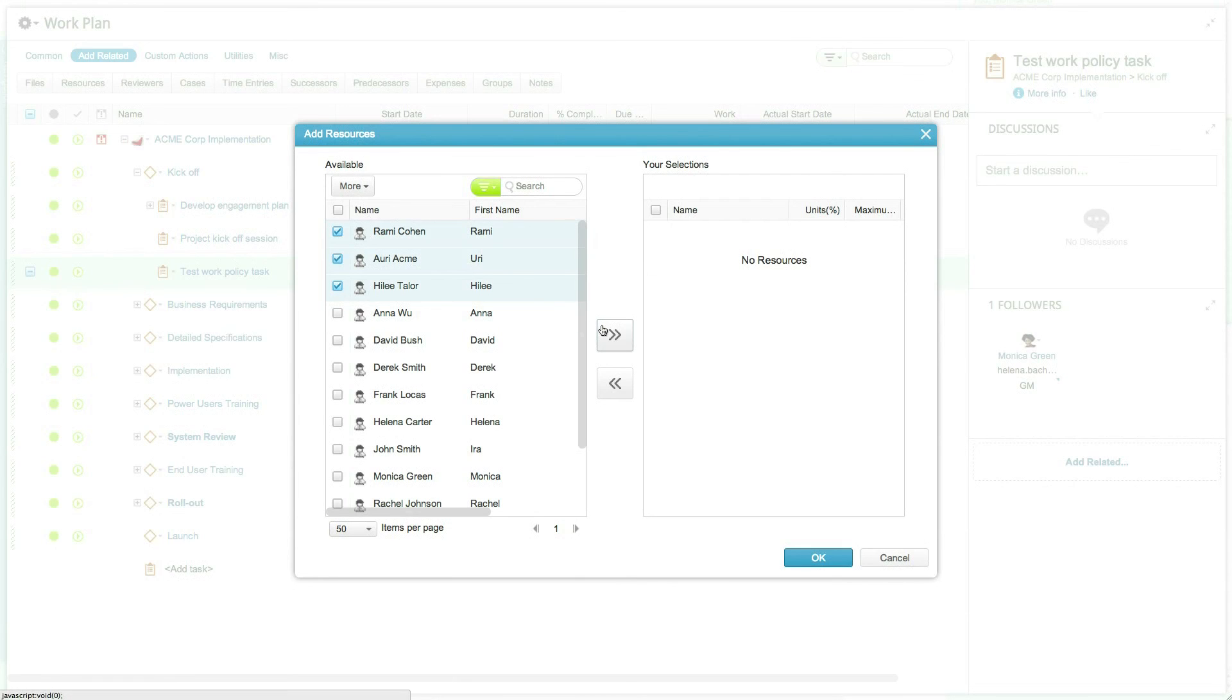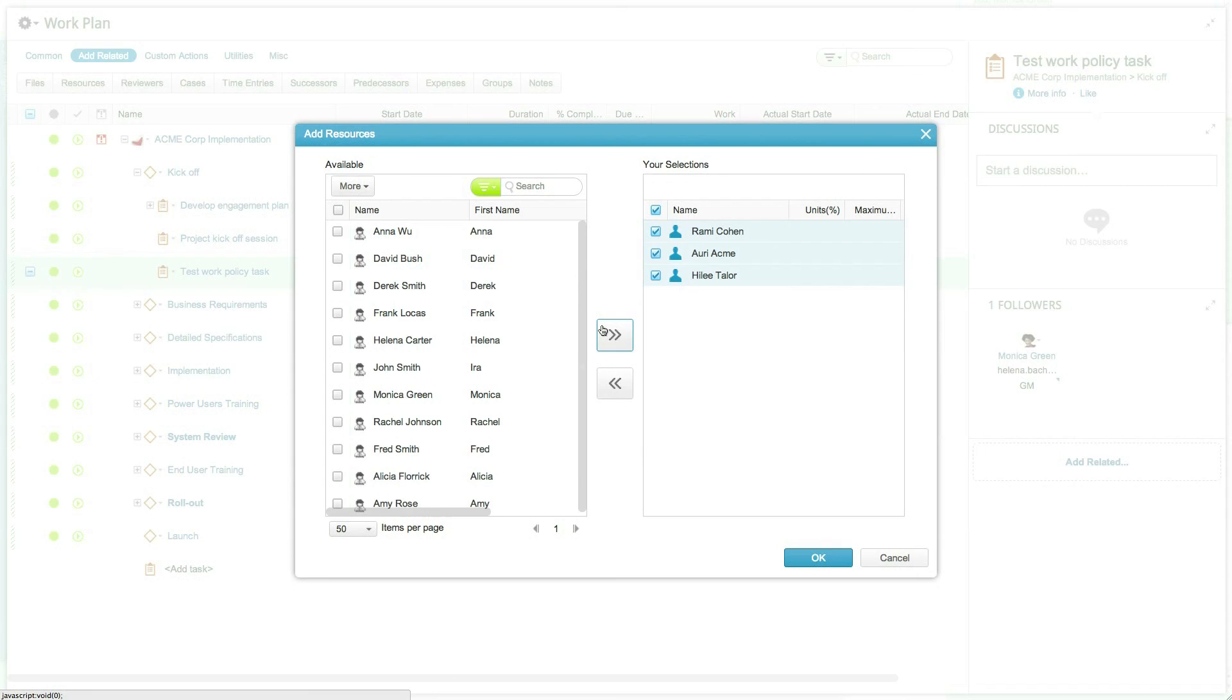Adding or removing a resource from a task will affect the work policy triangle calculation similar to the effects of changing the unit on any given resource.